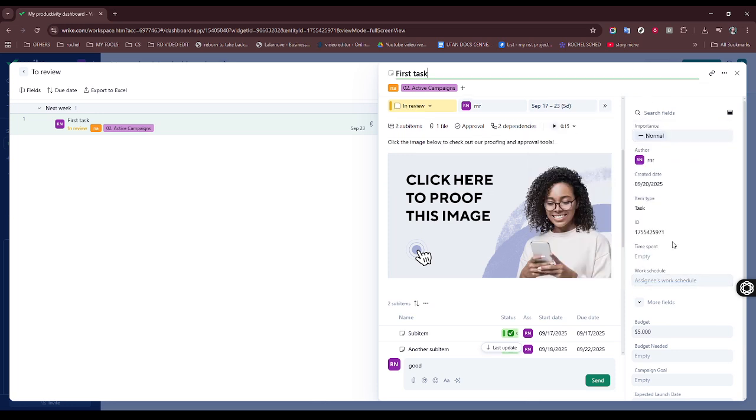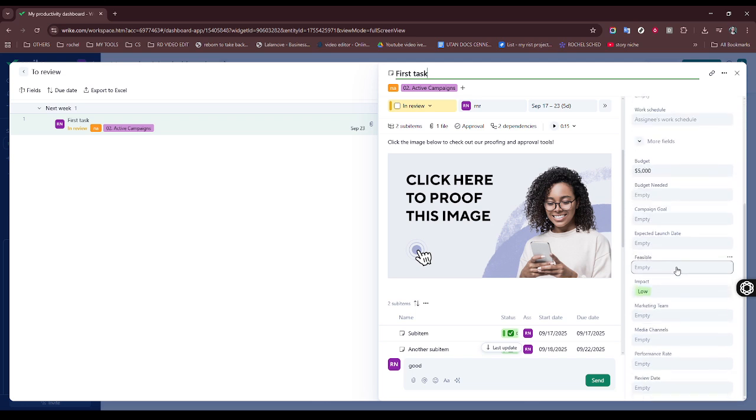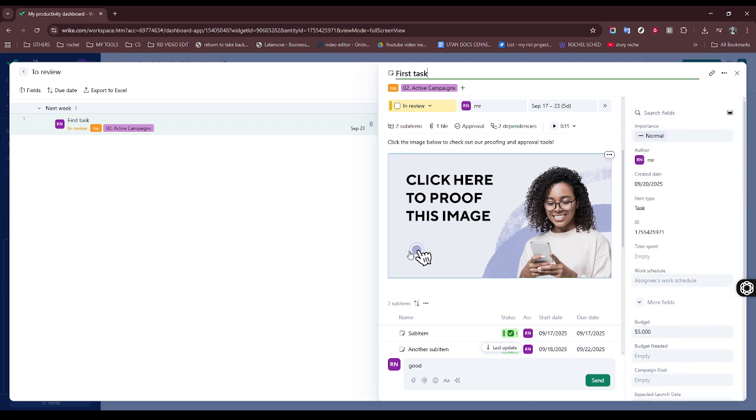Now that we have our tasks and timelines in place, let's move on to using the Gantt chart view to organize and visualize this information. A Gantt chart is a bar chart that visually represents a project schedule. It's an excellent tool for organizing tasks and making sure everything is on track. Input your tasks and their respective dates into the Gantt chart tool of your choice. This will generate a visual timeline of your project with bars representing the duration of each task.